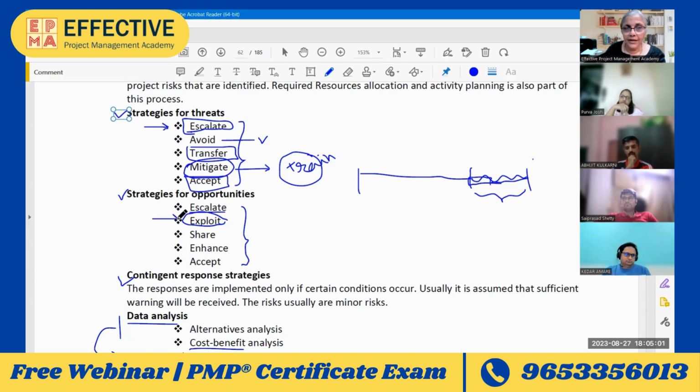What happened is this same customer was asking for some additional work to be done, which he had said beforehand, but we said, okay, we'll take it up later. Now that we are anyway having additional resources, it makes sense to do that work and get additional money. When I propose that, I'm adding to the existing opportunity, char chand upar. So enhancing the existing opportunity. When you are adding something to the existing opportunity, what are you doing? You are enhancing the existing opportunity.